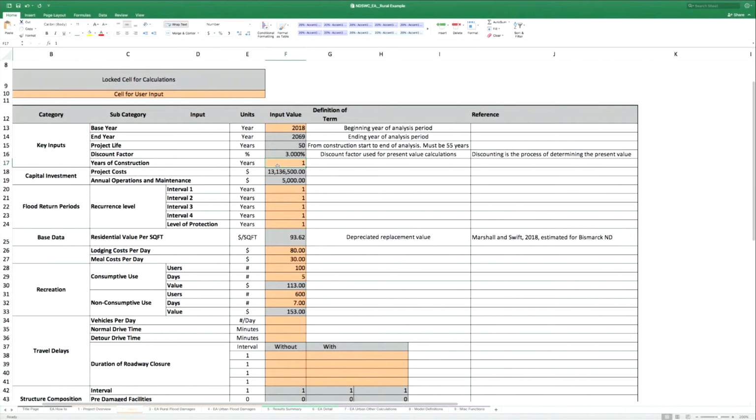The other thing we can say too is, you might design a levee today to a 100-year level of protection, but what do we know? There's uncertainty about the future. Does that mean your hydraulic conditions are going to remain the same? What if peak runoff changes and now your 100-year is only a 50-year? So your design level has changed, and because of uncertainty in that future condition, those benefits we estimated today aren't the same in 100 years. Those things come into play in terms of the benefit stream. So that's the reason why running 50 years is a reasonable life also.